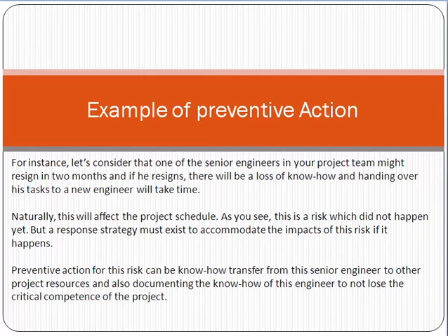You can take a backup. You can align a resource with him as a backup, so that he can transfer his knowledge to the other resource. Please remember one thing: if you can't take this action, what will happen when the senior resource resigns, if there is no know-how transfer between the resources? There will be a great gap